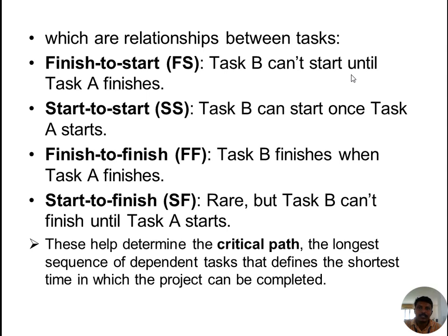For example, task B cannot start until task A finishes. Like earthwork completion, after that the foundation is laid. Finish to start means site work: completion of the site clearance, then marking of the columns. Start to start: task B can start once task A starts.